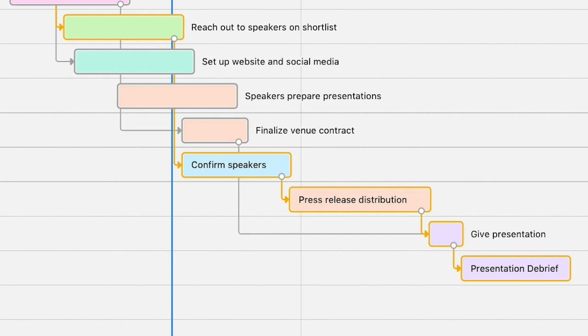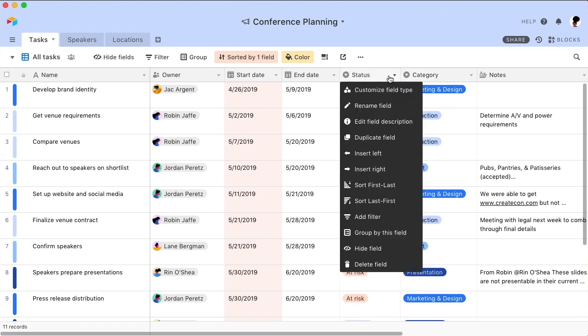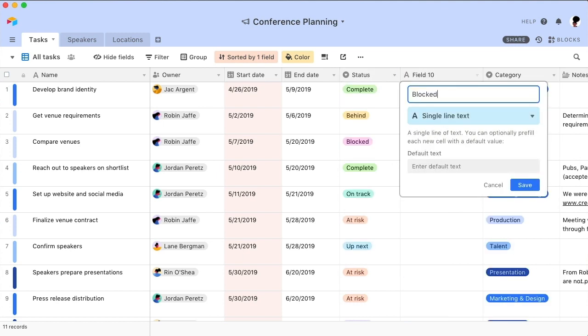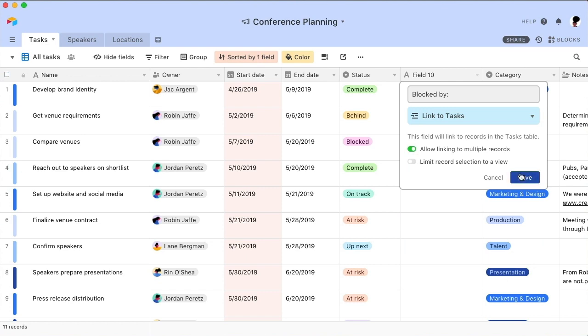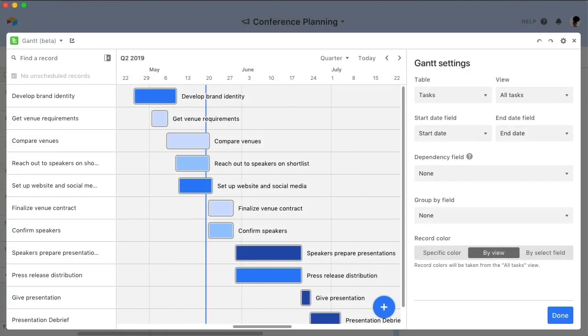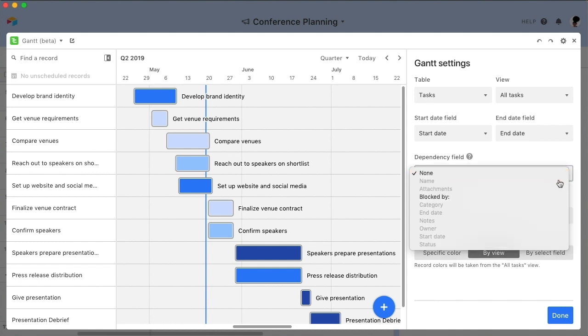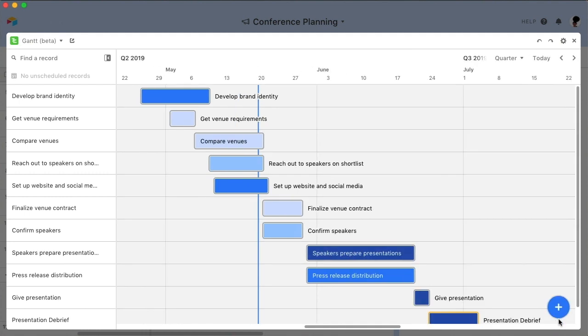To show dependencies on your Gantt chart, you need a field listing either a record's predecessors or successors. If you don't already have a field containing this information, create a new linked record field. I'll name mine blocked by and use it for predecessors. But instead of linking to another table, I'll link to the tasks table itself so I can reference other tasks on the same list. Now, I'll navigate to the Gantt chart settings panel and choose my newly created field from the dependency dropdown menu. I'll also make sure to choose predecessors instead of successors. Click Done.